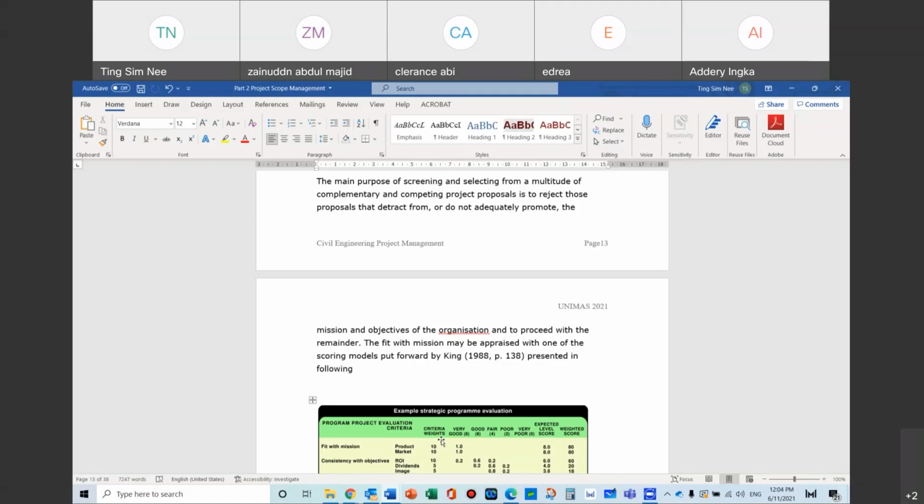All issues, social, environmental issues. Some issues cannot be related with dollars and cents. Some issues can. So your cost benefit, you can do it in two sections. One is anything that can be measurable with dollars and cents, like savings, like maintenance cost drop, and all these things that can be measured in dollars and cents, or fuel cost that drops because you created a new project. Then on the other hand, you have things that you cannot measure, the cost and benefit that you cannot measure in dollars and cents, like I said, medical, health, safety, education, legal, all these things cannot be measured in dollars and cents. So you need to do this initial screening.